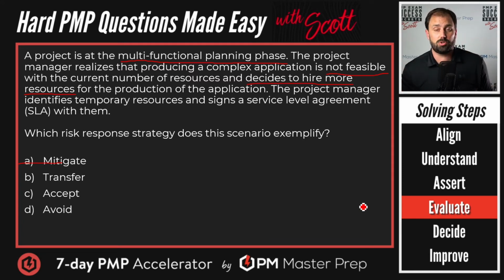Third party is responsible. Who is responsible in this situation? Us. We're going out there and we're hiring a few resources to serve a purpose and expand our labor force. All right, so it's still on us. So it's not technically transferring. Transferring, we say, we took these activities and gave them to a third party to run them. It's on them now. Obviously, the axe falls on us at the end of the day, but that's why we hired them, okay? So this is not transfer.